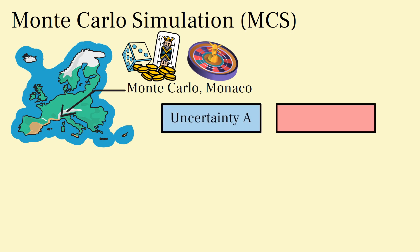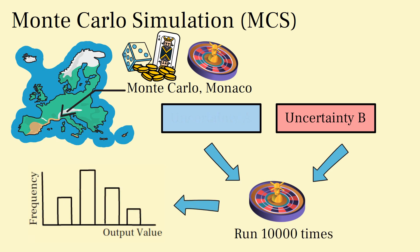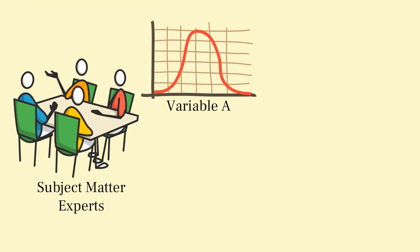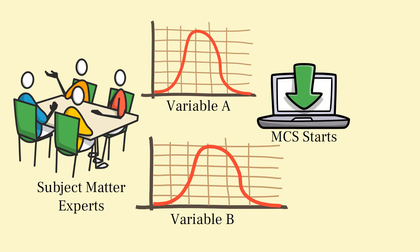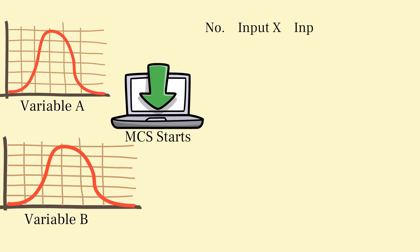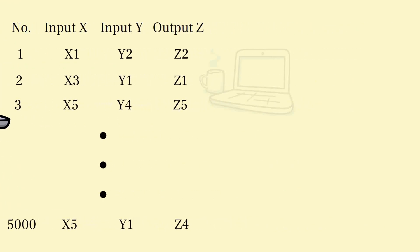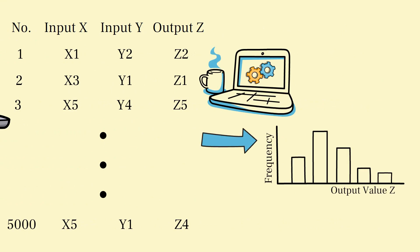Monte Carlo simulation allows us to model uncertainties by simulating a large number of possible outcomes. It's particularly useful when dealing with variables like cost, time, or resource availability. We assign probability distributions to these variables based on historical data or expert judgment. The simulation then generates random values within these distributions to create different scenarios. By running multiple simulations, we obtain a range of possible outcomes and their associated probabilities.